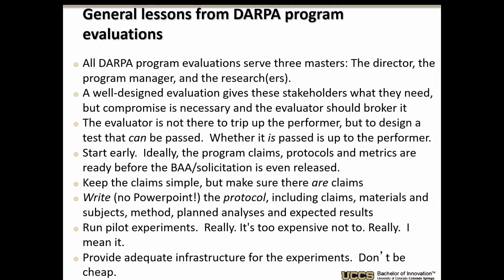And after talking to a bunch of researchers, they realized that goal wasn't going to happen. It's so far beyond what we can do now. It might be a goal you can sell, but you need a much narrower piece. And they came back with a much more scaled program, where at least in the first 2 years, things are within what we currently think has happened. The last 2 years, they actually put in everything they wanted to see, things that we currently don't believe can happen. But in the first 2 or 3 years, progress will be made, and they may readjust those final goals.